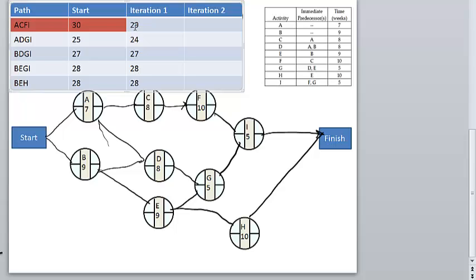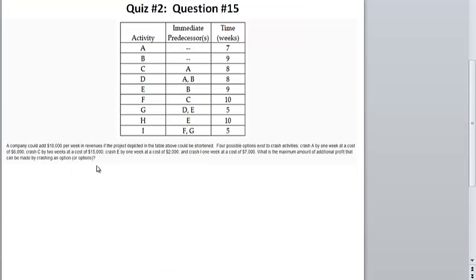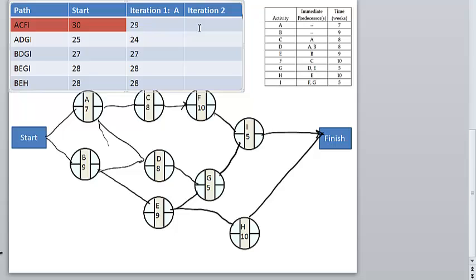So now you see that you still have ACFI as a critical path. For iteration one, you crashed A. Next, either C, F, or I needs to be crashed. C is at $7,500 and I is $7,000, and F is not on the critical path. So you crash I one week at $7,000. This path becomes 28, this becomes 23, this becomes 26, and this becomes 27.